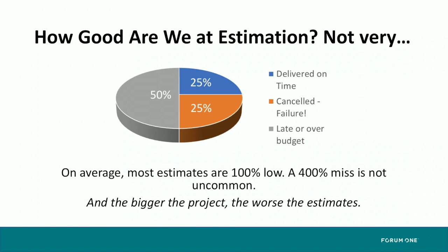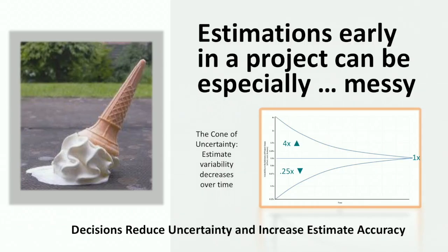The question is, wasn't there a rule that when a project hits $1 million in expended cost, there's probably better than a 50% chance it's more likely than not to be a complete failure? I think that's correct. And certainly the larger the project, the other related law is the diseconomies of scale of software: the larger a project gets, the more expensive it gets in a sort of exponential fashion.